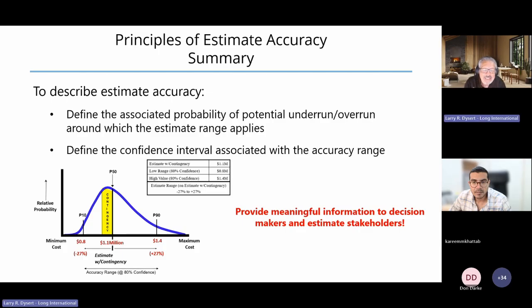When we're adding those things that change defining engineering technical deliverables, we have to regard that as a change in scope, and we simply have to communicate that to management and come back and ask for more money. Because if we don't ask for more money and we fund that out of contingency, then we're going to run out of contingency in most cases.